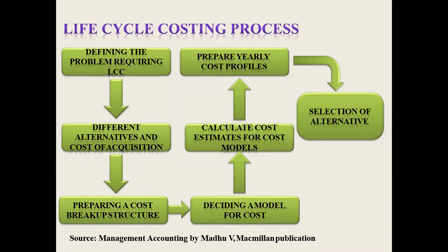For slabbing purpose, at each level, each floor, what cost is required, what is the thickness of slab and whatnot. These are the main points. If you go a little bit deeper, what is the plumbing expenditure, what is the electricity expenditure. Is it right? So that is nothing but the cost breakup structure.